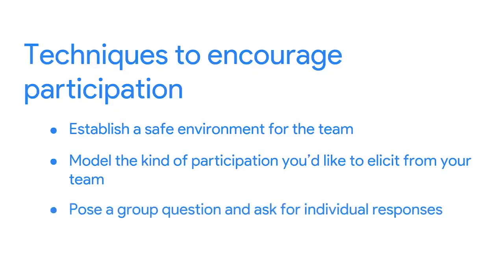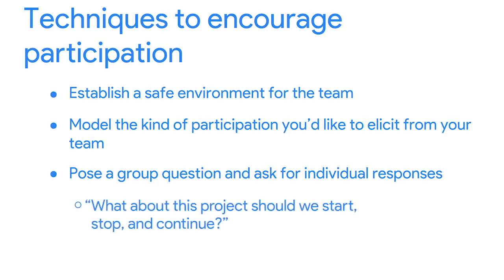Another useful technique to encourage participation is to pose a group question and ask for individual responses. For example, you could ask your team members to each think of one success and one challenge from the project so far. Then ask each team member to share their responses. If you find that a question you've asked doesn't get the kind of response you'd hoped for, try phrasing it in a different way. For example, if questions like, what went well and what went wrong, don't get you the responses you'd like, try alternatives. Maybe ask something like, what about this project should we start, stop, and continue?